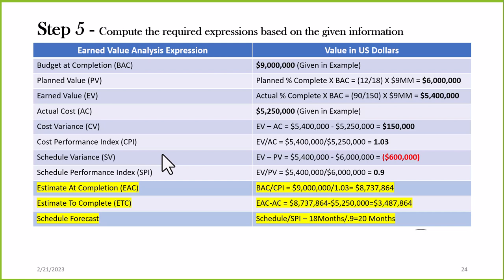How often? Let me say this. If you're spending a lot of money, you better be doing it quite often. You may be doing it weekly in some cases. You may be doing it monthly in some cases. But you want to make sure that you gauge this and that you're completing this periodically throughout the project. If I'm halfway through the project and I realize I'm behind schedule, I have 9 months left to get caught up. And potentially I can get caught up in that 9-month period of time.